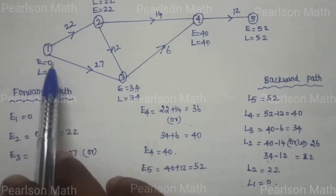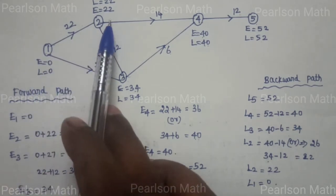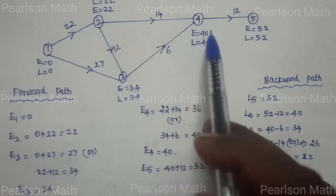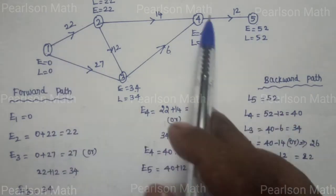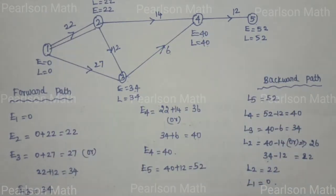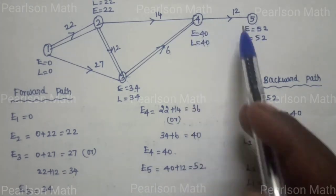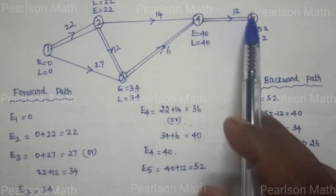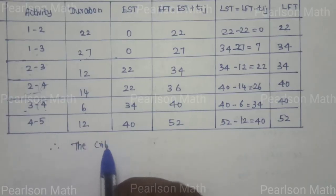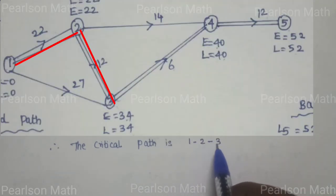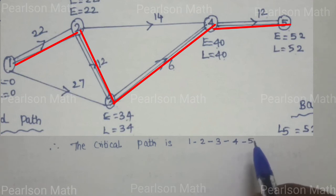The table values show the critical path where E value and L value are the same. If you join the critical path: 1 to 2, 2 to 3, 3 to 4, 4 to 5. So this path is the critical path. The critical path is 1-2, 2-3, 3-4, 4-5.